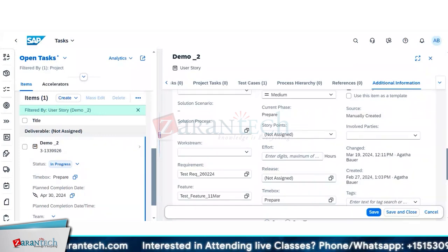Or if one test case suffices, then you can have one test case. But in all probability, you will have multiple test cases for testing one business process, because one business process will have multiple entities to it. It could be you're checking anything. So that also you have to decide. But probably the testing-related decisions could come a bit later, because during the realize phase, or at the start of the realize phase, you are going to onboard your testing team so that they can help with the testing. That can come later, but it still has to be decided.